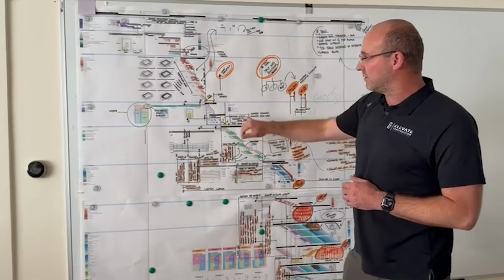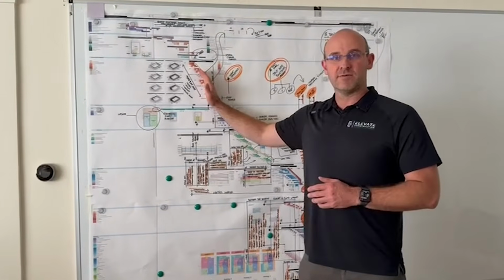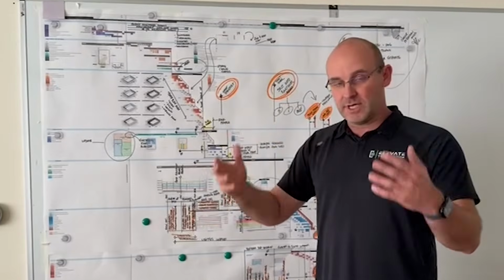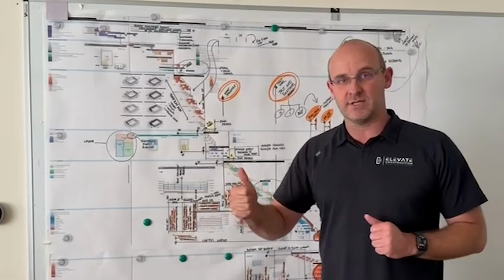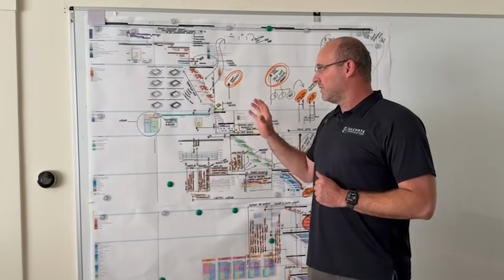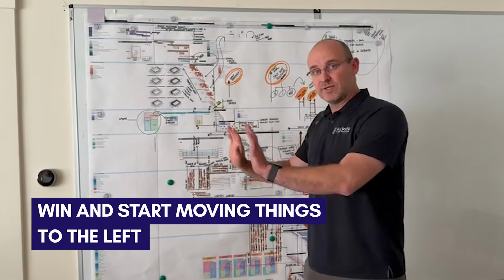And then when you get down to the norm, and you do your day-by-day planning, that's when you should gain buffers, and that's where you do your look-ahead planning, your weekly work planning, your day planning. But for this high-level strategic, see it in one place. So if you do this right, you will always be able to win and start moving things to the left on the job site.